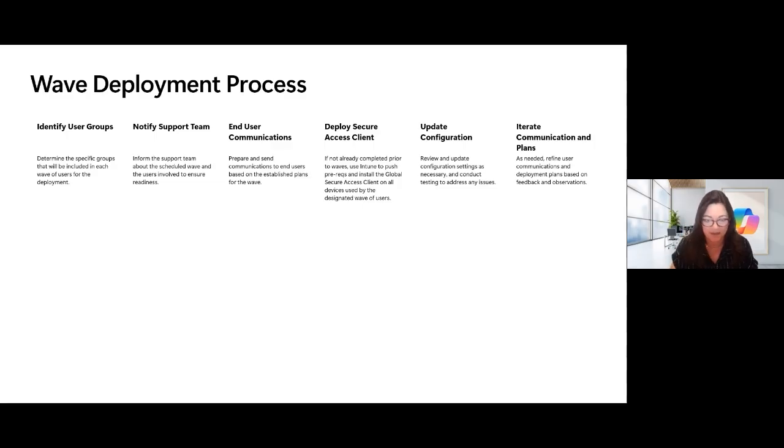You'll schedule each wave. Is this going to be a weekly deployment, a twice weekly deployment, a couple times a month deployment? It will matter about your support desk, how much your support desk can handle, how many users you want to do in each wave, what your milestones are, and if you're also going to be working in between this with other work streams like onboarding per app access.